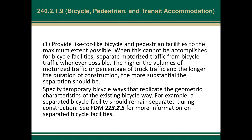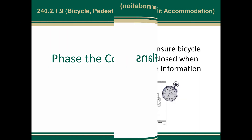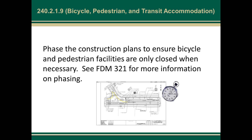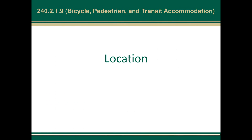We specifically want this information included because as we move toward more separated bicycle facilities, it's going to be really important to keep the design user in mind. If in the past it's been a separate facility, we don't want to suddenly put them in a shared lane condition if possible. We also talk about phasing: phase the construction plans to ensure bicycle and pedestrian facilities are only closed when necessary. See FDM 321 for more information.